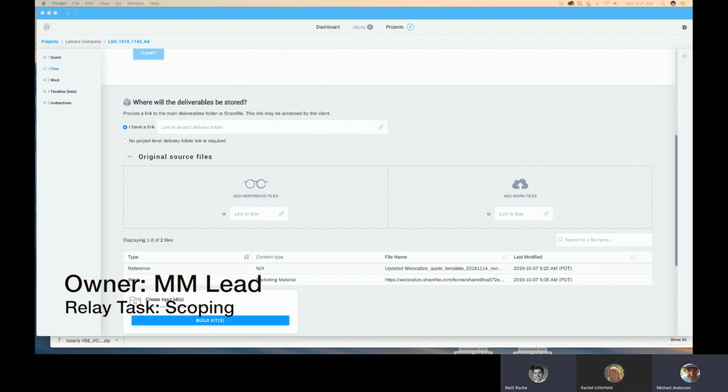And in terms of how you're normally quoting a video with on-screen text, at the quoting stage, are you ever producing any type of storyboard, or does that happen after quoting? Yes, an OST storyboard, and I do have one I can put in there. Now, I would think that would be considered a work file then, not a reference file. You tell me. We put it together to confirm with the client what's in scope. We're assuming that all of these on-screen text instances are in scope, but they need to confirm yes or no, because that is actually part of what we'd said with the quote. But I would put that in as a work file. As a work file, okay.